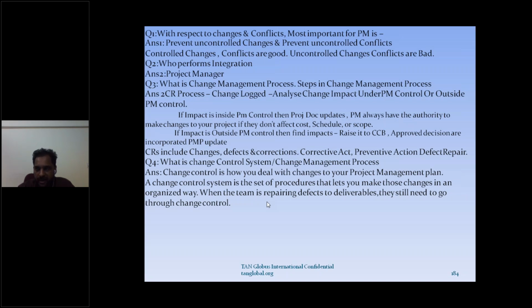Say this is 100 issues. We will require another 15 days and 5 resources to solve these issues, and that has to be replanned, and the plan should get revised. Now the target is that the 100 issues are also part of the scope, and you should complete with these extra resources which are approved by the CCB. Making sense? So decide a change and change control meetings.